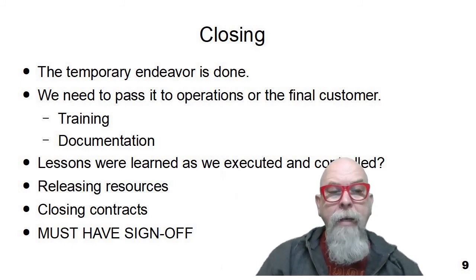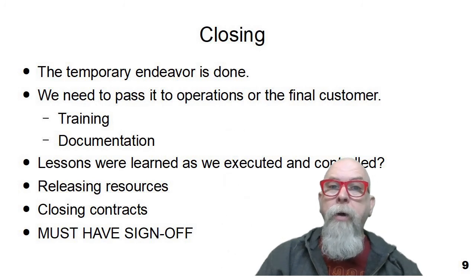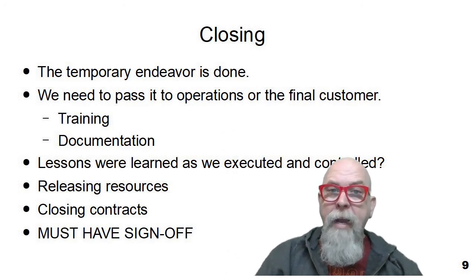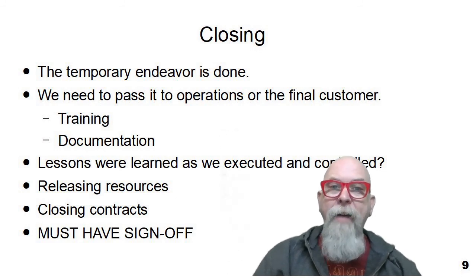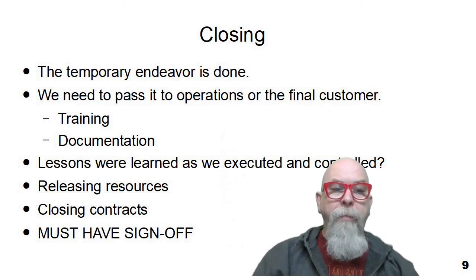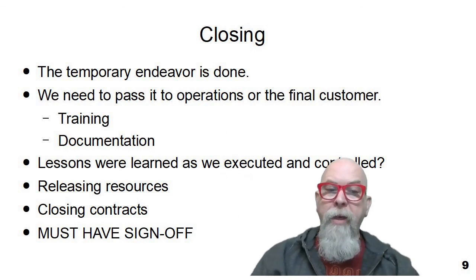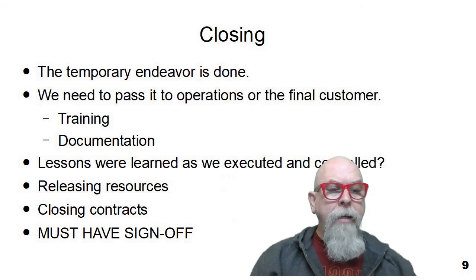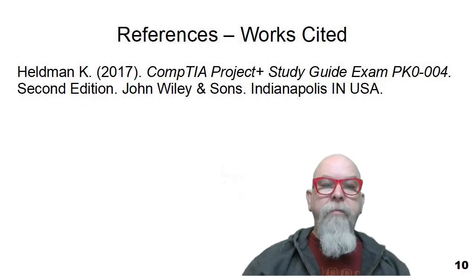And lastly, we need to have a sign-off of the project from our sponsor, from the person who signed off on the beginning documents to give us the money to do this. We need to have everyone sign off that the project is done. And this needs to be a very formal thing, and we'll talk about this in a subsequent presentation.